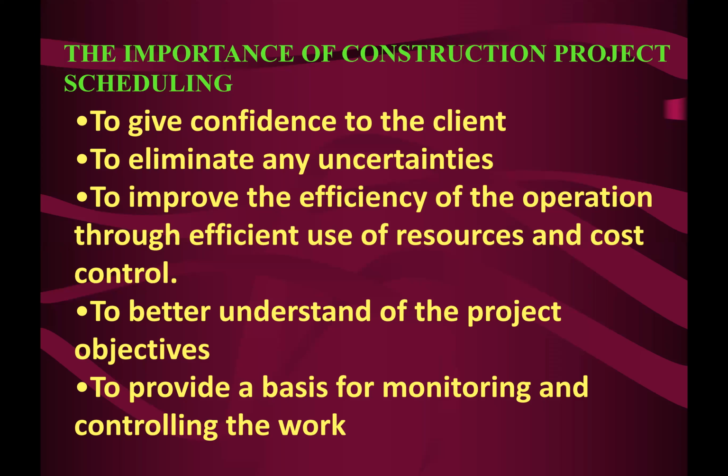But in the tender requirement submission, one of the things that you need to submit is the work program, or what we call scheduling of the given project. If you do not submit, you will be considered maybe disqualified because you do not fulfill one of the main requirements of the tender submission.